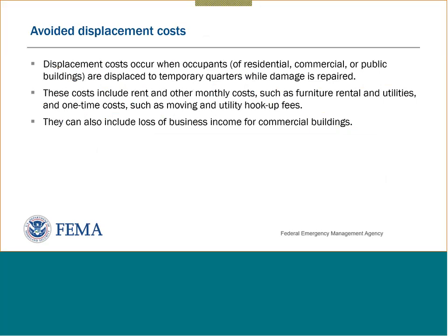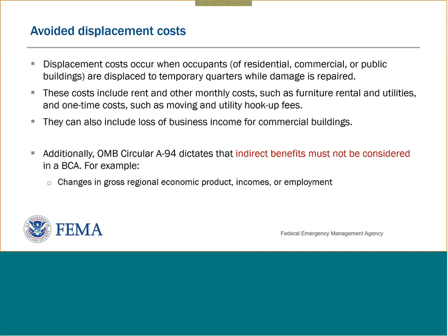Displacement costs. Earlier I mentioned that these are essentially the costs that are incurred when you have to move to a temporary location to operate from while the damage is repaired. And you can include rent and other monthly costs and one-time costs, you know, for moving, your utility hookup fees and that sort of thing. And when we're talking about commercial buildings, it can include a loss of business income. Next slide, please.